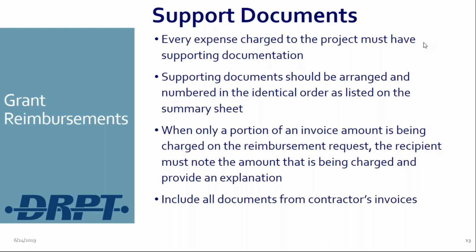Include, if you have contractors doing work, I'm sure when they bill you, you're getting a lot of support documents from them on what work they did and things. We want to see that too. Don't just give us a one pager that says our contractor's billing was $15,000 this month. We want to see the back details on what work they performed.